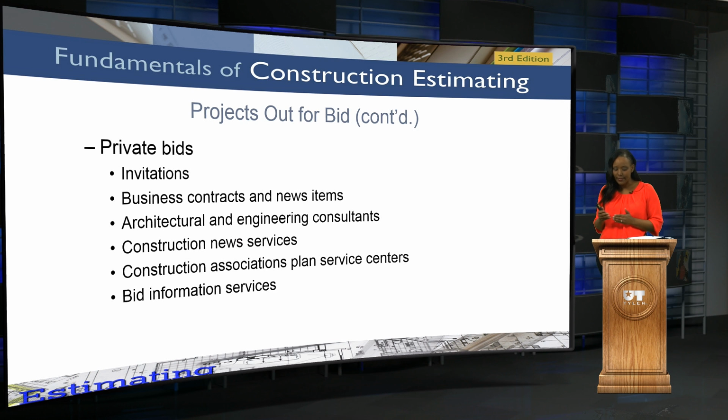With this type of system, the number of companies invited is usually a lot smaller in comparison to your open bid system. And usually it's going to be people that the owner typically knows or they've done business with in the past. So that's why you see it as an invitation. A lot of schools typically, if you're a private school institution, you'd see something like this. But, you know, it's a little bit of a different setup.